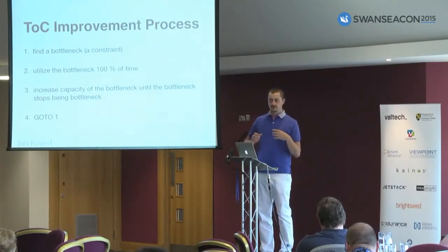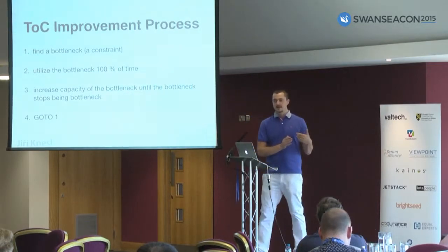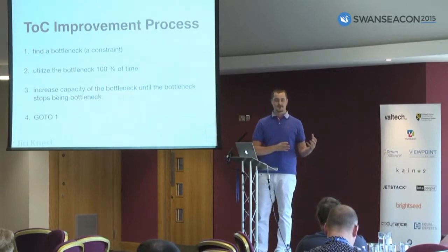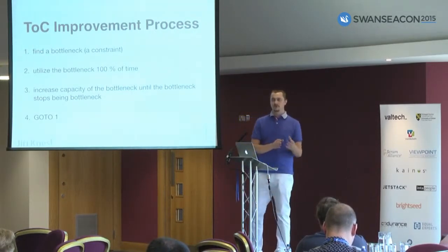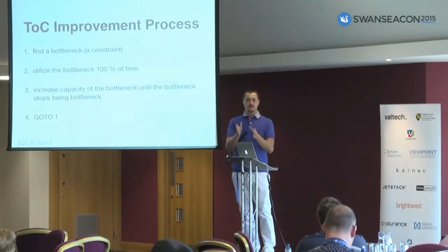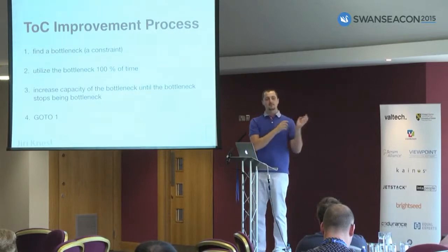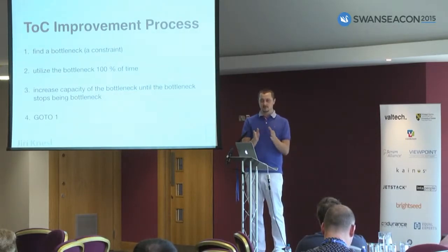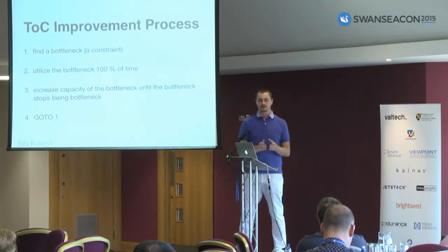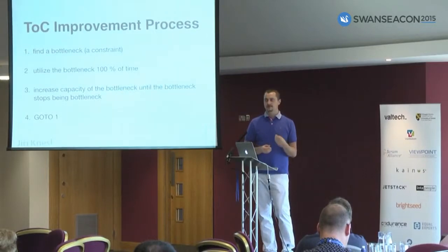If you, for example, work much faster in the part which isn't the bottleneck, before the bottleneck, it will lead to a situation where you have a lot of work in progress. For example, you have a development process where you have analysis, development, and then acceptance by the product owner, and the development is the bottleneck. In this situation your product owner is creating a lot of stories and putting them into development, and development is the bottleneck, it usually is, but I will speak about it later, it leads to a 100 kilometers long backlog because they are not able to handle it so fast.